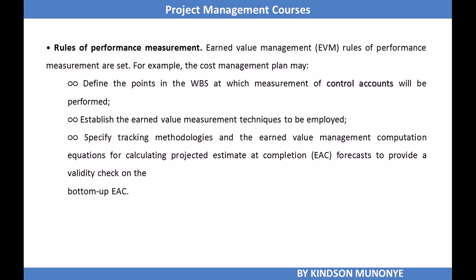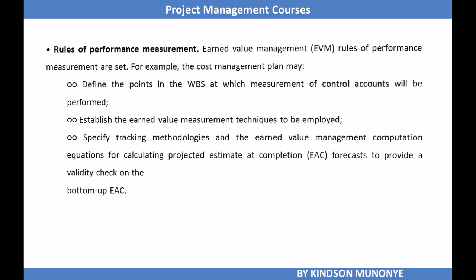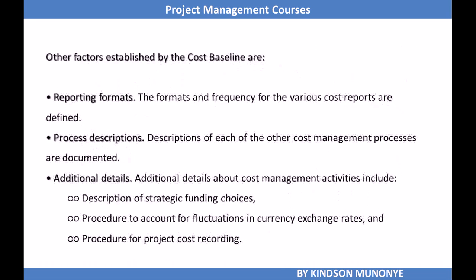We have a point in the WBS, that is control accounts we've mentioned, earned value measurement techniques to be employed, and tracking methodologies. All these are specified in the cost management plan. Other factors established by the cost management plan are reporting formats. The format and frequency for various cost reports are defined in the cost management plan, along with process descriptions and additional details. So this is how we are wrapping up the plan cost management process.